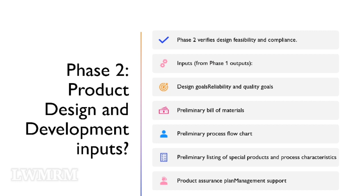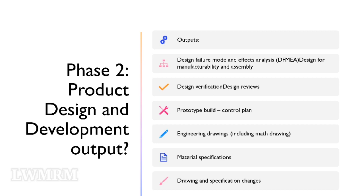Phase 2 — Product Design and Development — verifies design feasibility and compliance. Inputs are from Phase 1 outputs: design goals; reliability and quality goals; preliminary bill of materials; preliminary process flow chart; preliminary listing of special products and process characteristics; product assurance plan; and management support. Phase 2 outputs: Design Failure Mode and Effects Analysis (DFMEA); design for manufacturability and assembly; design verification; design reviews; prototype build; control plan; engineering drawings including math drawings; material specifications; and drawing and specification changes.